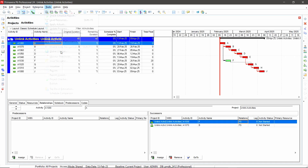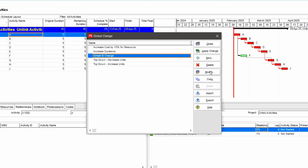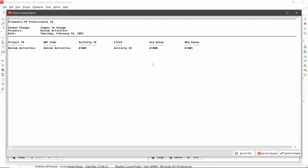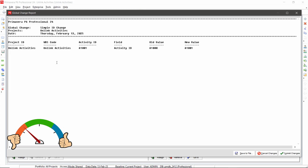I've created a simple global change that looks for an activity with ID A1000 and changes it to A1001. If I click 'Change', I get a report — a review of what's going to change. Now we have the project ID and the WBS code. Project ID is great because with multiple projects open you might not realize you're running a global change on two projects. WBS code helps confirm you're targeting activities in the right WBS. That's another thumbs up.